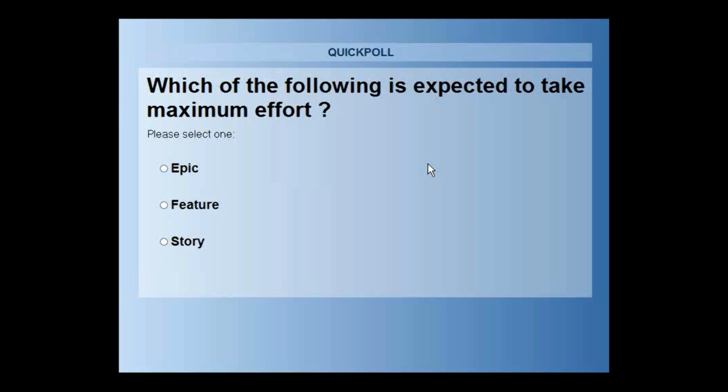Now, when to use SAFe? When you have a big agile implementation, when you want 100+ people working on one particular product or one particular value stream, you should think of having a program layer. Once you are done with having a program layer, you should think of how do I align portfolio level decision making till my team level working. So it's a framework which gives you an approach which helps you to align the investment decisions and investment prioritizations done at a portfolio level, and the execution which is done at the team level.